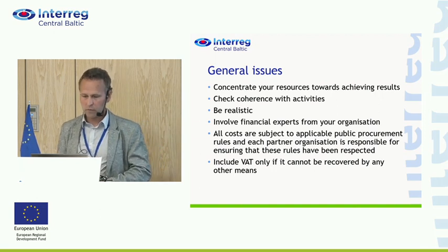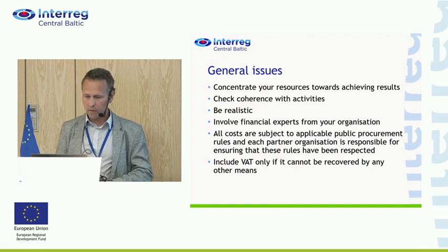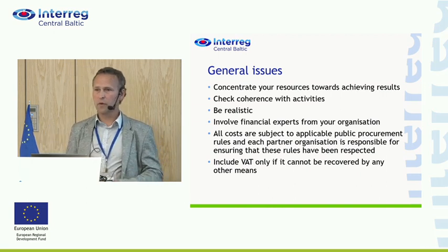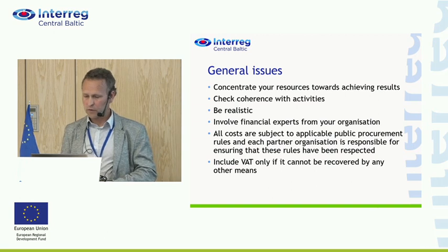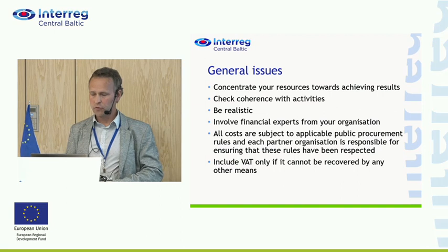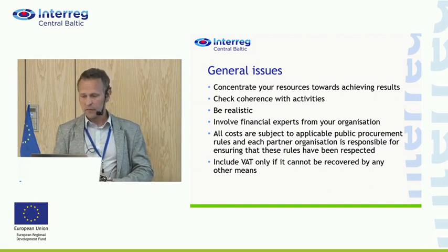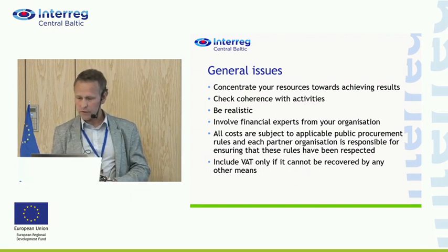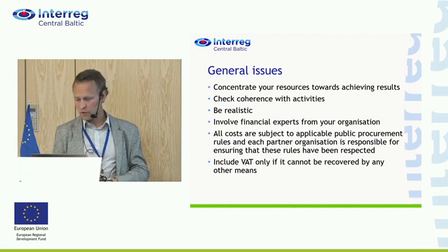Don't forget that all costs are subject to public procurement rules, so follow the instructions in our program manual, what the program sets, but of course your own national legislation connected with these issues as well. And the VAT issue: VAT is included in the application and in the project only if it cannot be recovered by any other means, which probably mainly is connected with the local legislation. So if you can't get VAT back from other sources, then you can report it to us and then it would be eligible as well.